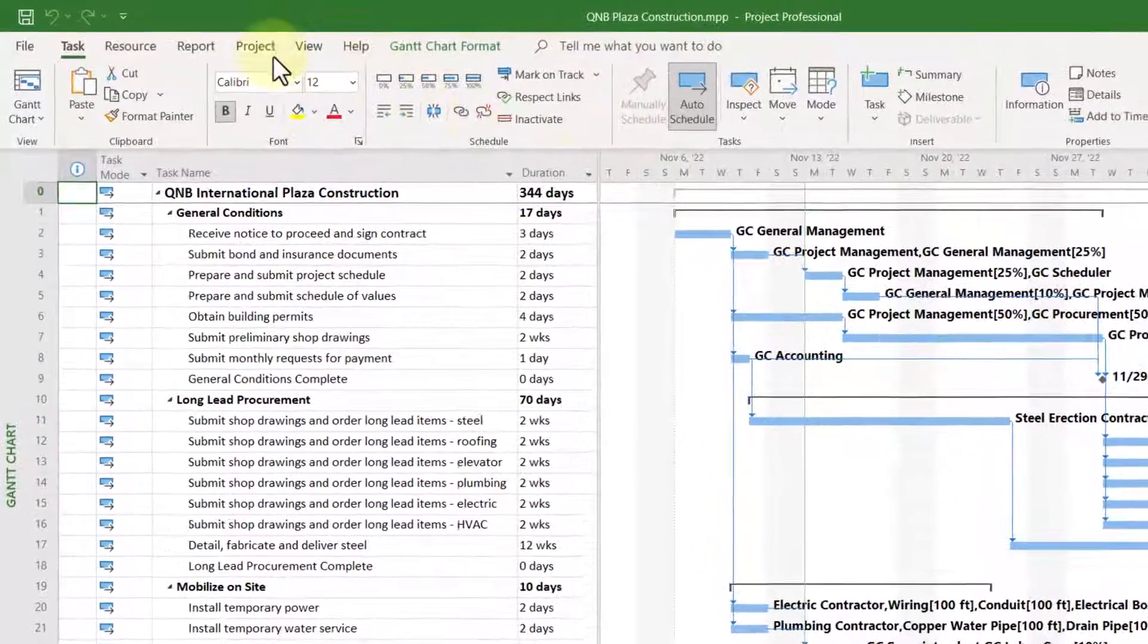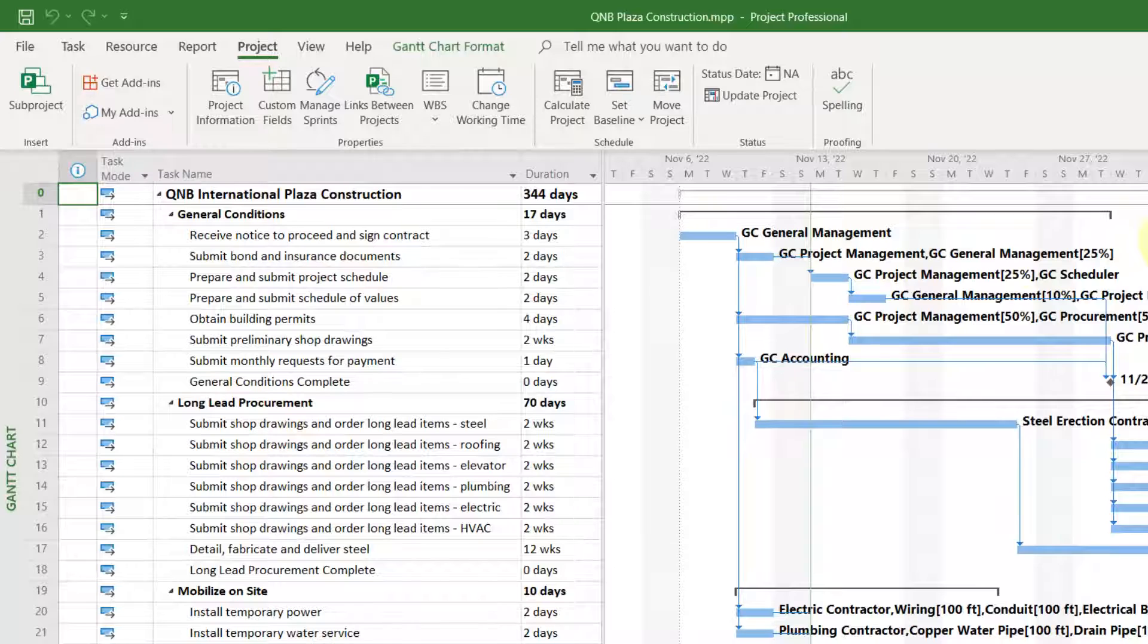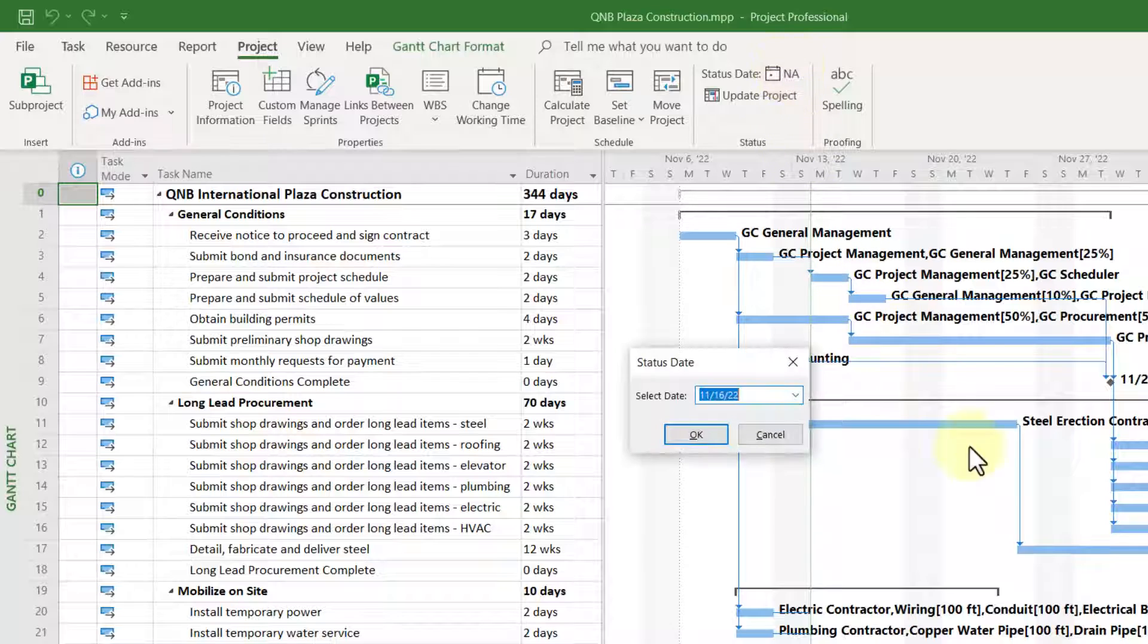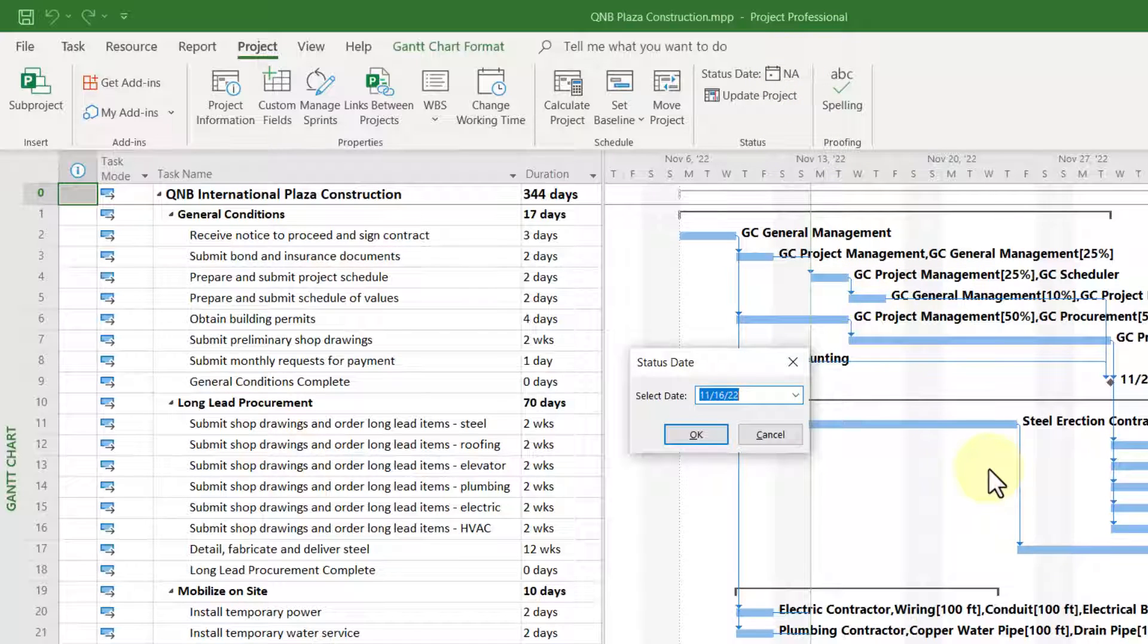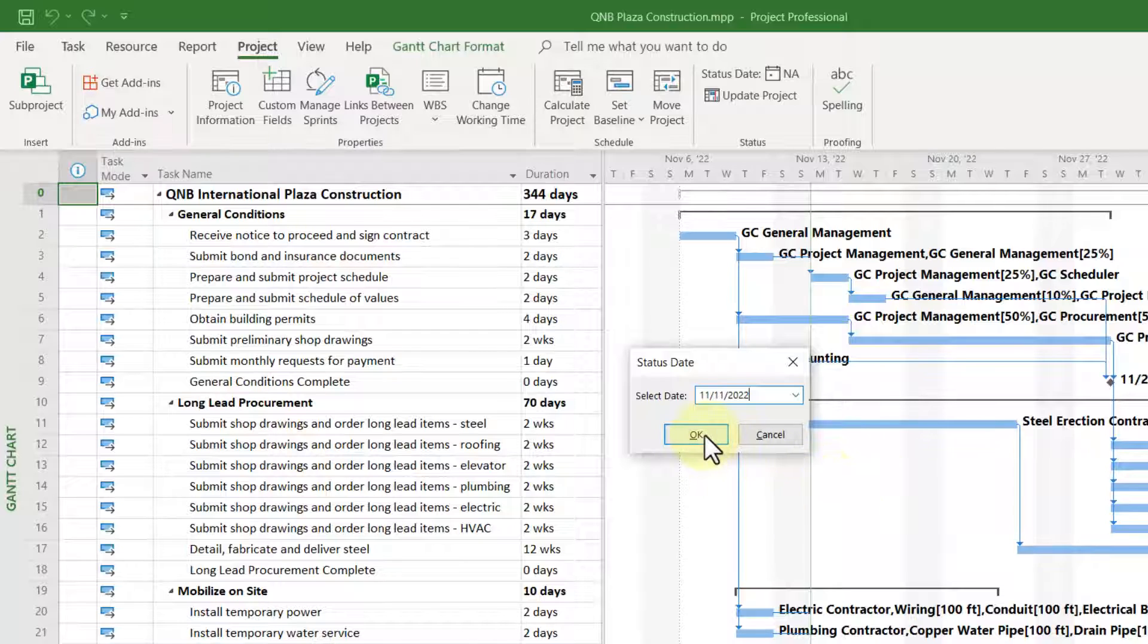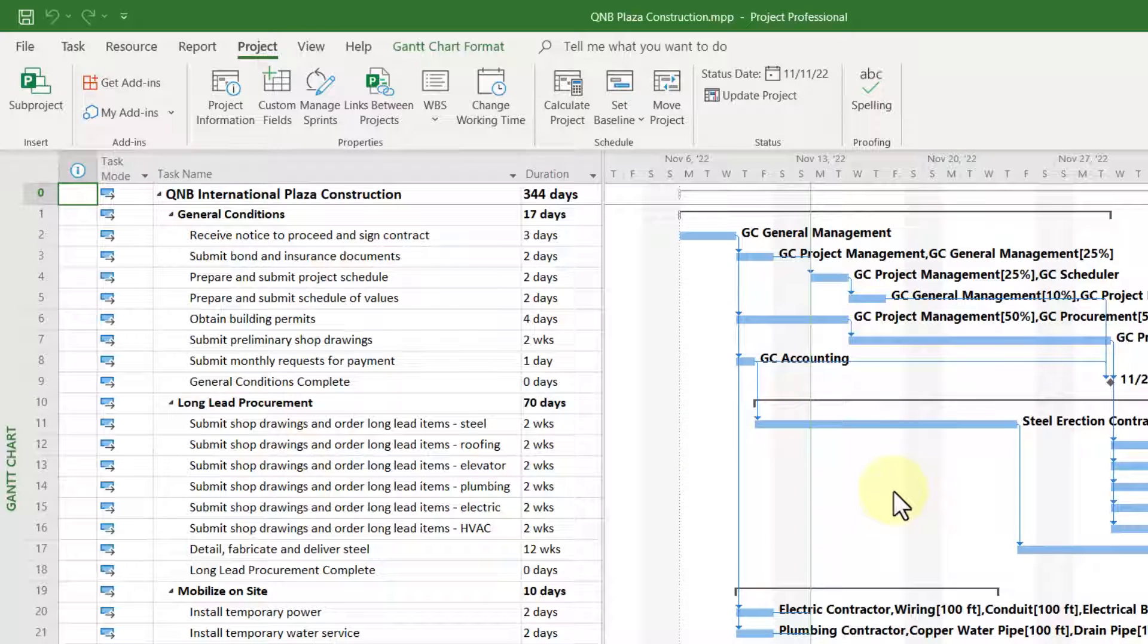To do this, click the Project tab to display the project ribbon. Then click the status date button at the right end of that ribbon. The status date by default is initially set to NA. So in this dialog, you'll need to enter the date that represents the status date for your project. In my case, I've selected Friday, November the 11th. When finished, click the OK button. That sets the status date for the project.